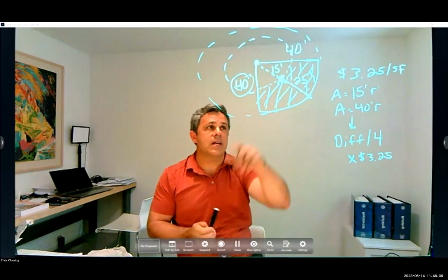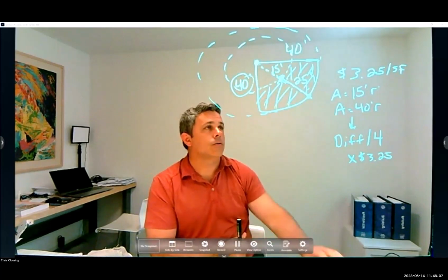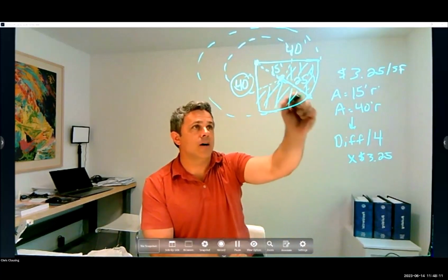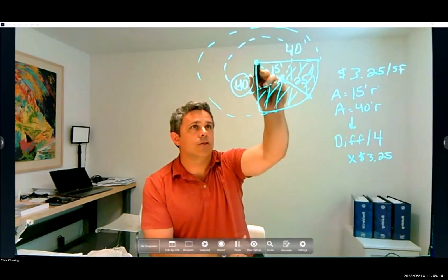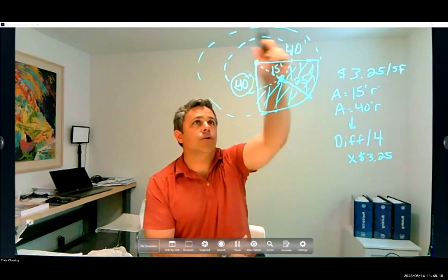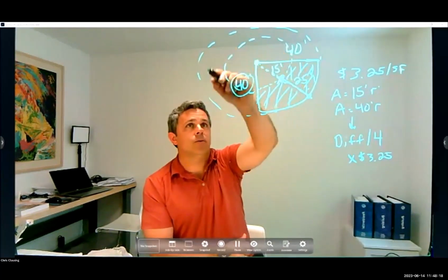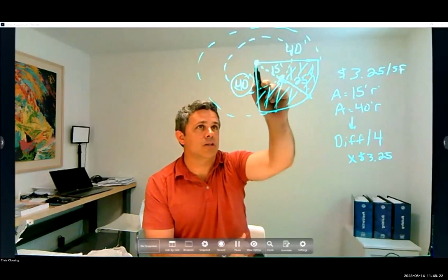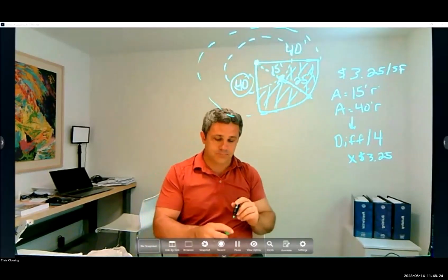So I have seen that one as well. But just remember on this one, the radius here is not 25. You have to take the small circle and then the big circle. Once you find the difference, you get the donut shape area, and then you divide it by 4 just to get this shape here.